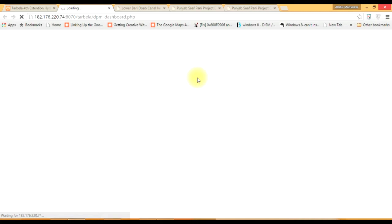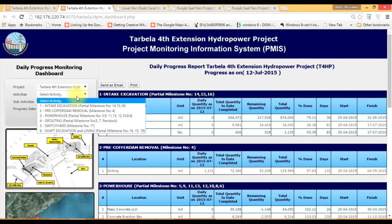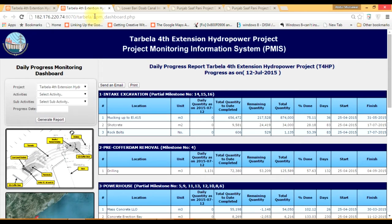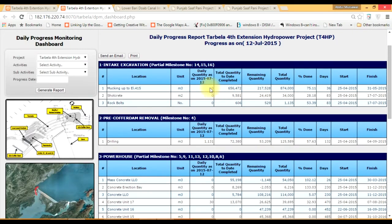The system is live, so it will take a little time to load the data. Here you can see that this small panel provides you access to all data, components, and subcomponents. On this side, you have progress tabulated. If we look at one table, it shows units, daily quantity, total quantity, remaining quantity, total percent done, number of days, start date, and finish date. The system also has the additional facility of sending email automatically without human interaction.